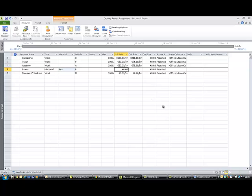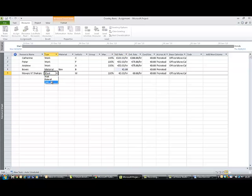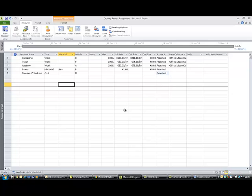And then Movers and Shakers are not work either, they're a cost. They're going to be a moving company that you're going to use, and you will assign the cost when you use them. So you just change that for now and you don't put in anything else in their columns. So you've now entered your resources and you're ready to begin to use these resources on your project.